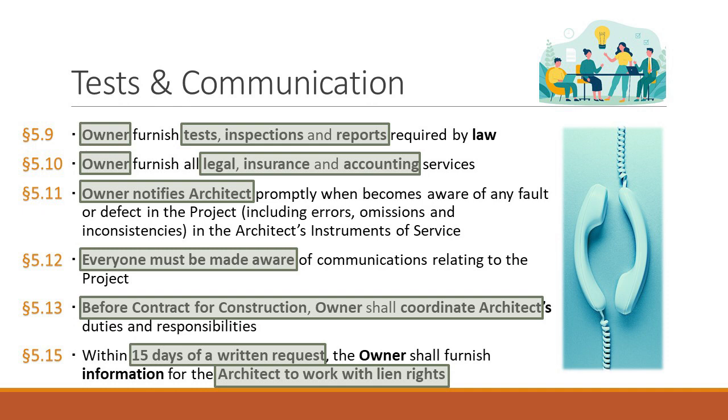And so the first two sentences, the first one says, the owner shall include the architect in all communications, meaning you, owner, must make sure that the architect is aware when you're talking with the contractor. And then the second part says you have to notify of the substance of any direct communications.